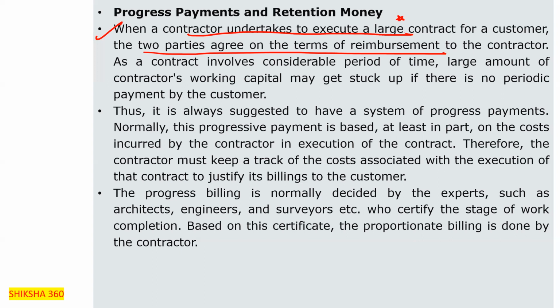As a contract involves a considerable period of time, a larger amount of the contractor's working capital may get stuck up if there is no periodic payment by the customer. It will take a long time and a larger amount of capital is involved.